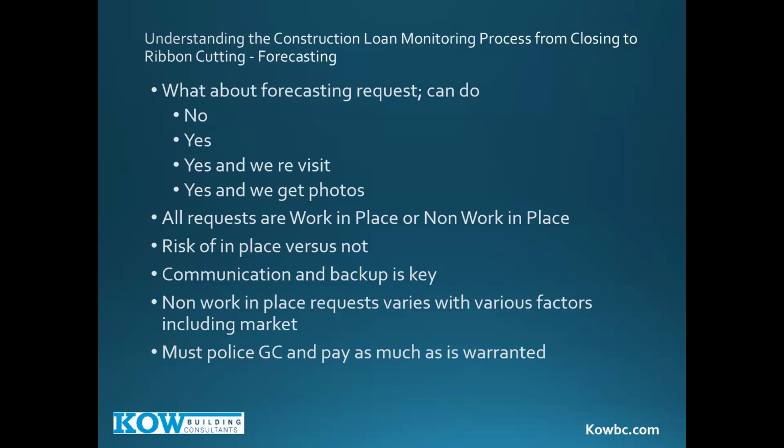In our opinion, there's 4 ways to handle that. They want a forecasted request. Answer number 1 is no, it's not allowed. Answer number 2 is yes, it's allowed. Answer number 3 is yes, it's allowed, and we'll be back next week, but that's another fee. And answer number 4, which is most common, yes, it's allowed. We will not issue our report until the super sends us photos, and actually we like video as well, but photos showing that big ticket item is now installed.